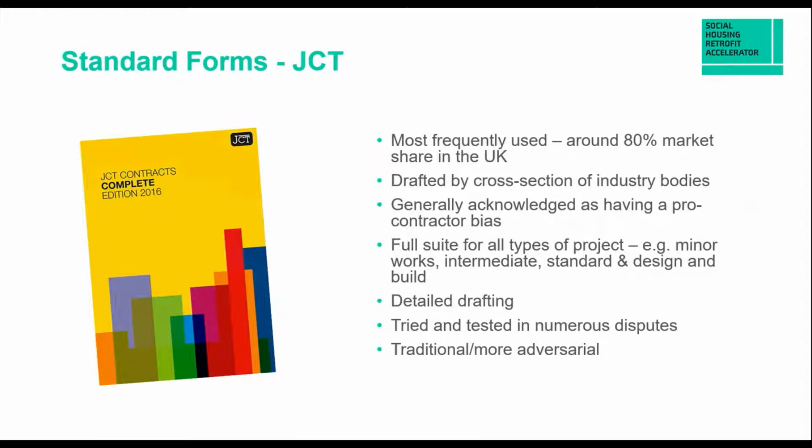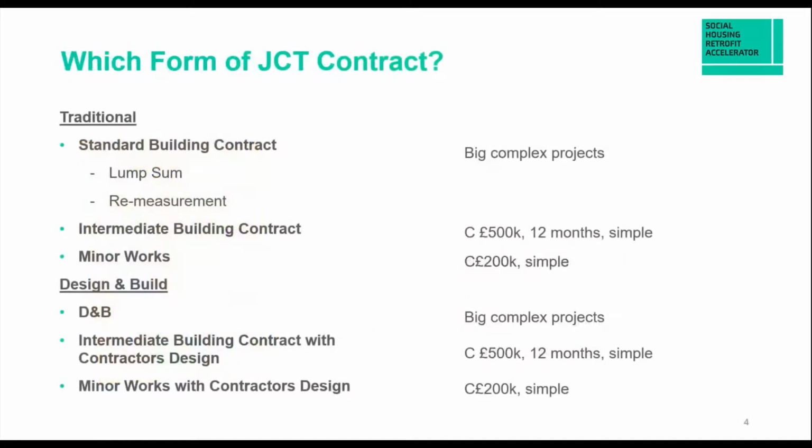If you could move on to the next slide, please, Andy. So on this slide then, I've shortlisted the forms that may be most suitable within that JCT suite, although the most suitable form will link back to what Andy's discussed, specifically the delivery model. So this slide focuses on contracts for traditional and design and build delivery models, but you might need to consider other contracts. So for example, if there were requirements to incorporate ongoing maintenance after the build of the works or the design and build, then a different contract may need to be considered here.